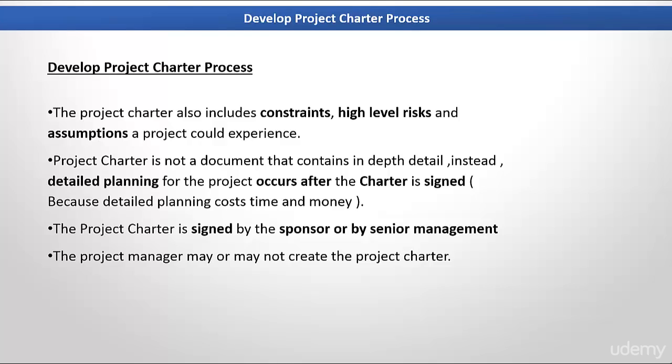We should keep in mind that the project charter is signed by the sponsor of the project or by senior management. The project manager may or may not create the project charter. The sponsor may ask the project manager to create the charter, or the charter may be already created before the project manager is brought on board to manage the project.